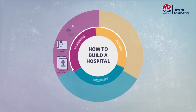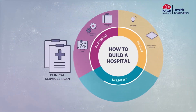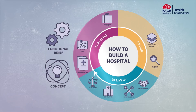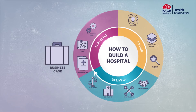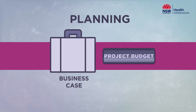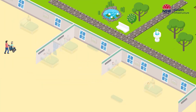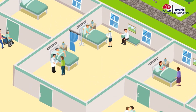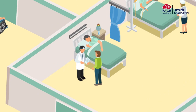We combine information gathered from the Clinical Services Plan, Master Planning and the Concept Design to develop a business case. The business case outlines our scope for the project and determines our budget for the redevelopment. Following the completion of the business case, we engage further with project user groups to inform the schematic design planning phase.